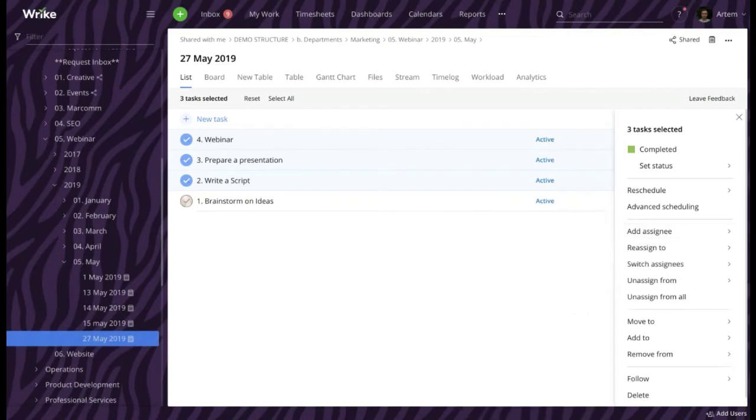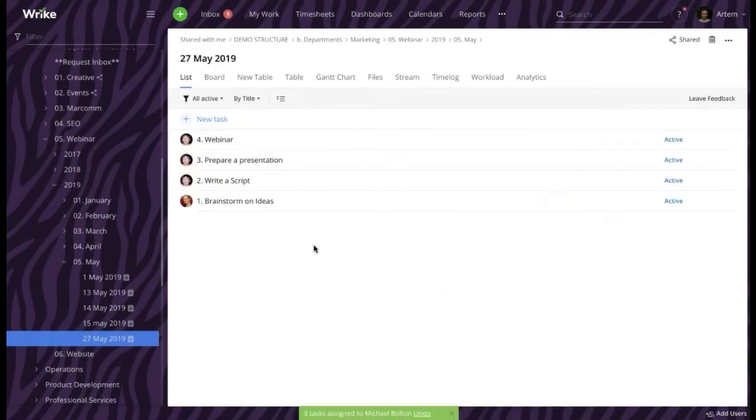Let it be Michael. Alright, all 4 tasks are now properly assigned. What do we do next? Well, the next step would be connecting these tasks into a dependency chain, because all 4 tasks need to be completed in a certain order. I cannot prepare a presentation until I have a script ready, nor can I, for example, conduct a webinar until I have prepared a presentation.